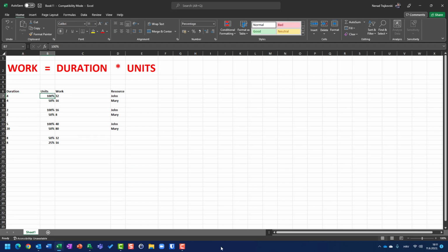On the other hand, John is going to work 100%. So he is going to work 4 days multiplied by 8 hours per day multiplied by 100%, since he is supposed to work 8 hours. Mary is going to work 4 days, but only 4 hours per day, which means 16 hours.